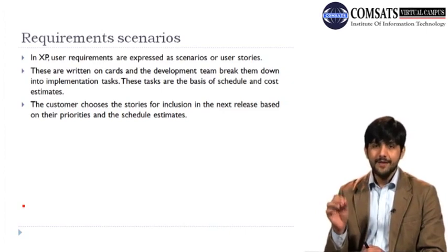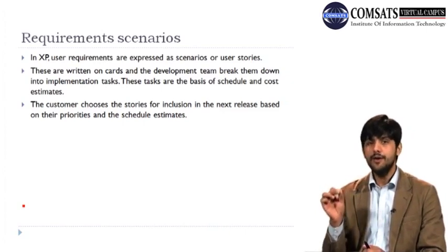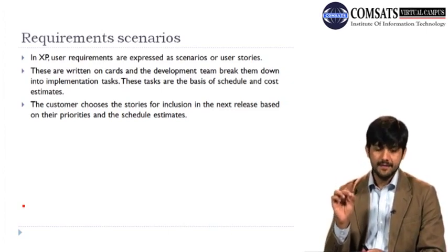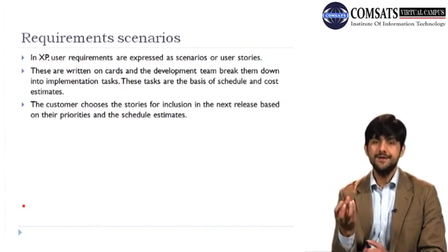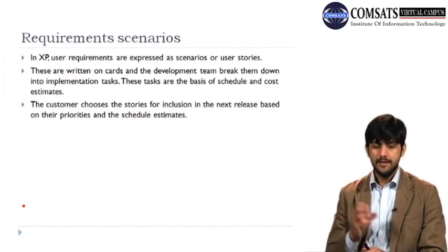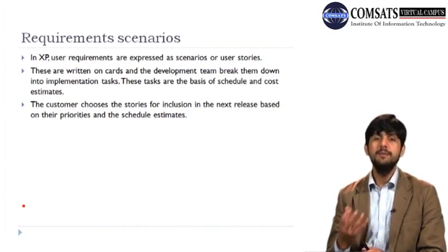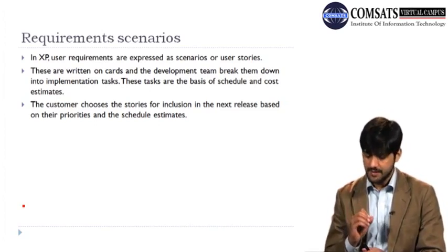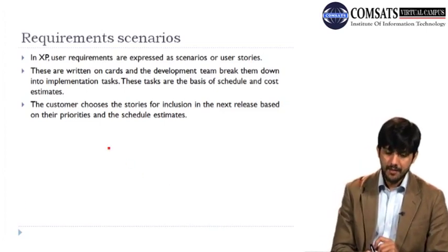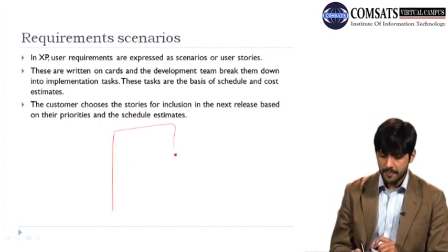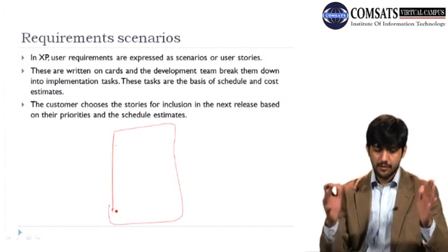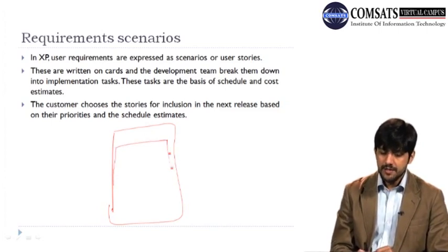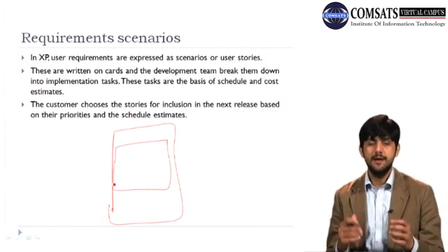And one thing very interesting: as I said, when we are following a certain methodology, we need to be very formal. What extreme programming believes is that these stories are written on cards, and the development team breaks them down into implementation tasks. These tasks are the basis of schedule and cost estimates. So imagine that this is an A4 sheet that we normally print, the normal size of the paper. Now these cards are actually smaller. So this would be the size of the card on which these stories are written.